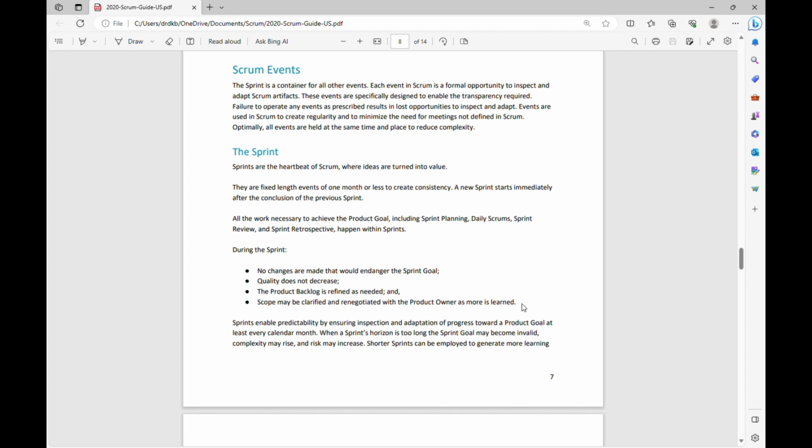So during the sprint, if the team identifies that some additional tasks need to be added as part of one of the user stories which they initially didn't think of during the sprint planning, and because of this some additional work is coming in the scope of the sprint, they might need to slice down some of the items which are not of much priority as of now and can be taken up in the future sprints. So those adjustments can be made along with the PO, and the team can negotiate with the PO on it and work on it.